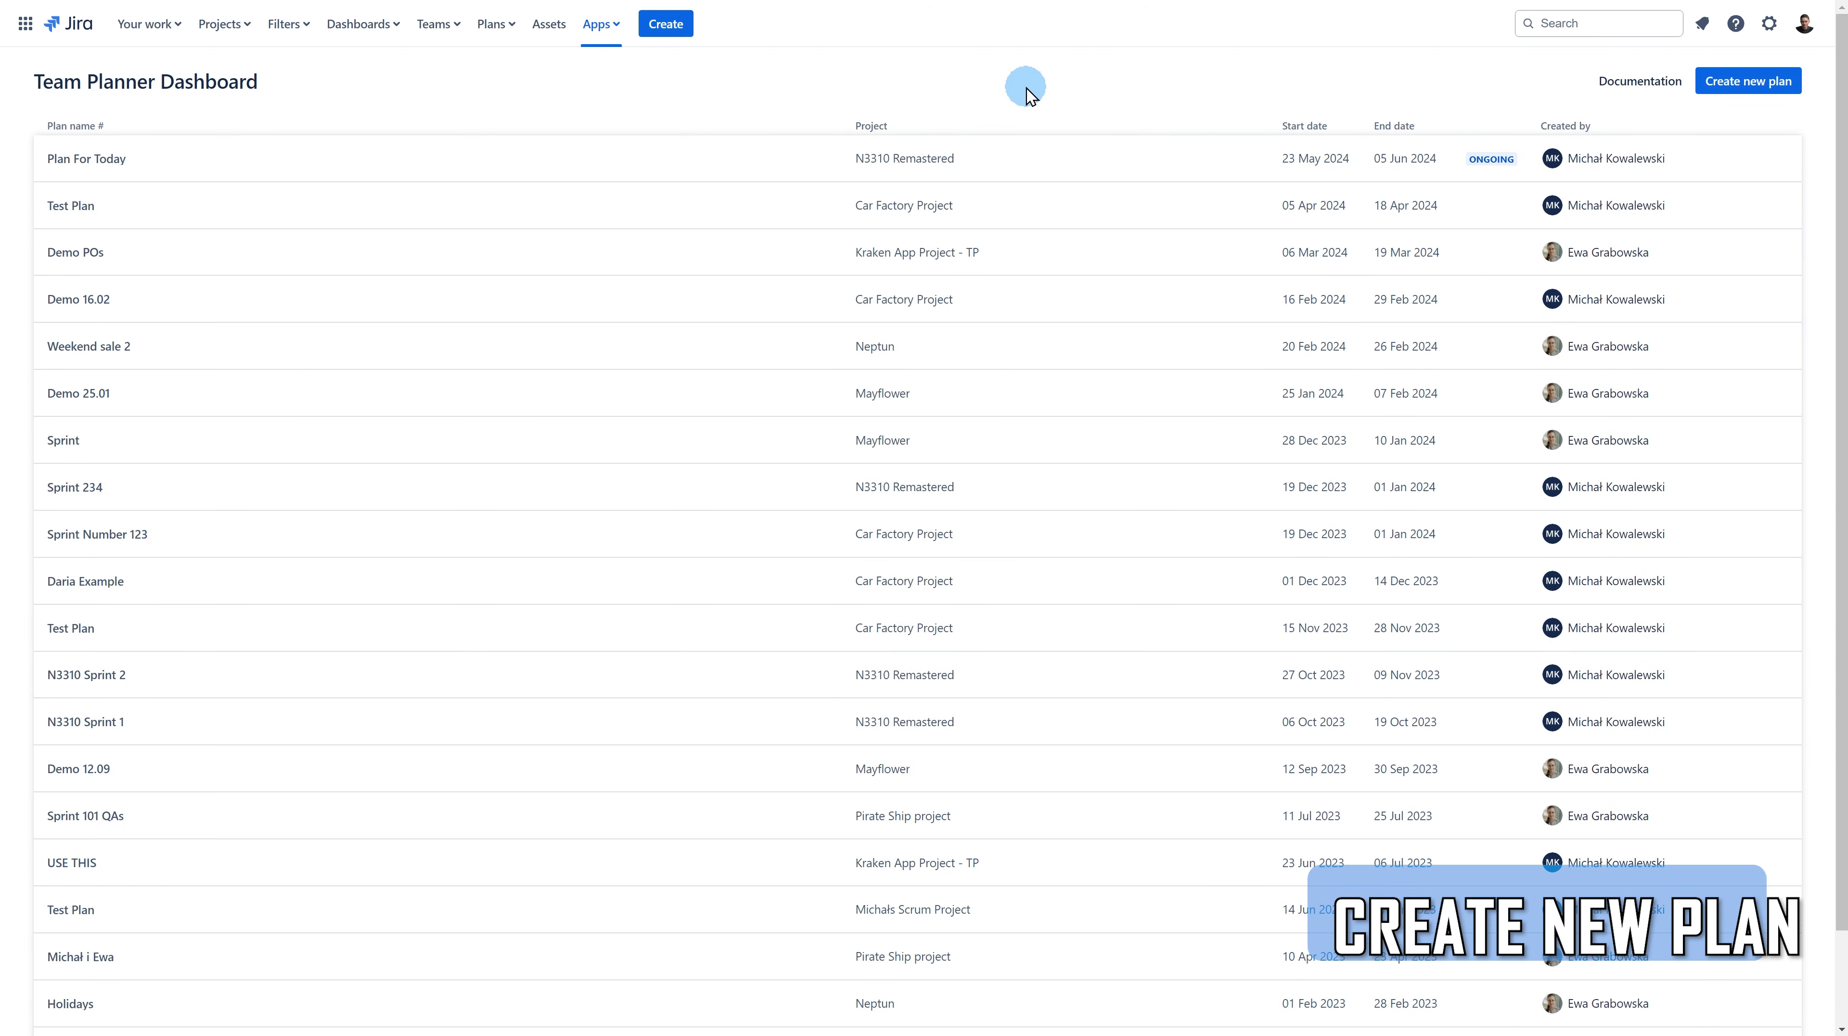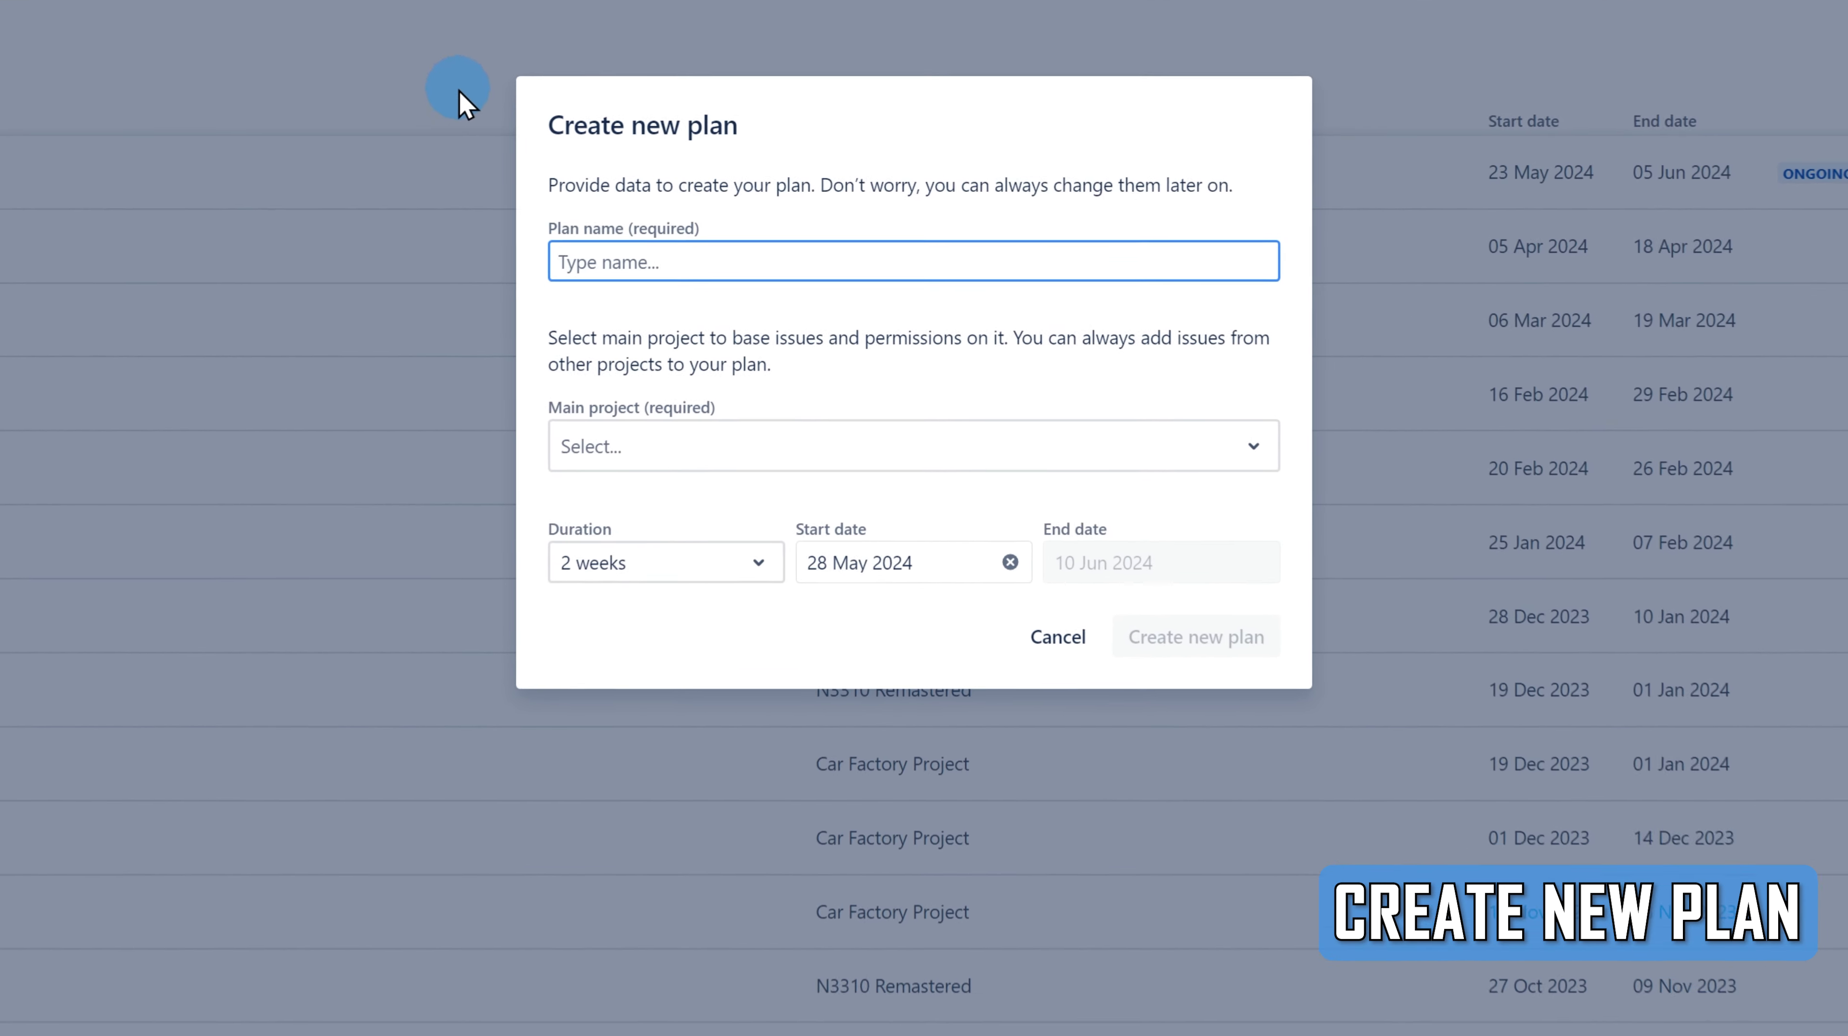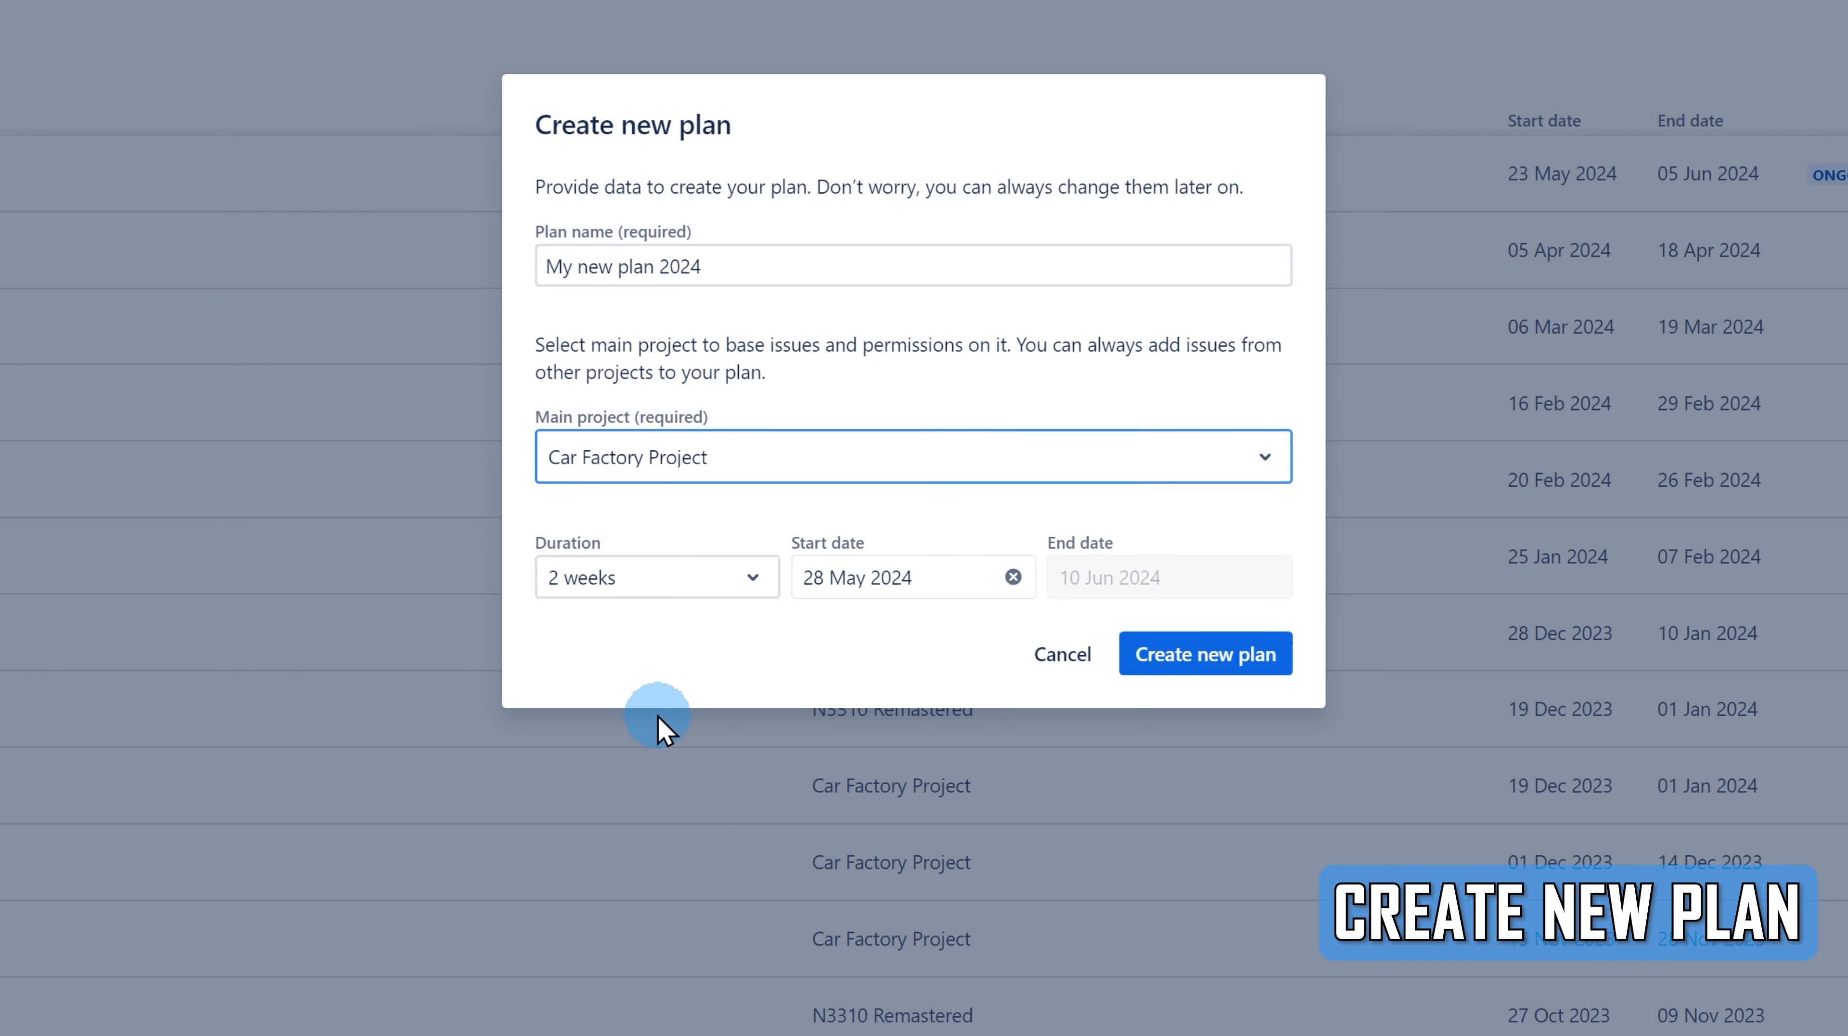Being on the Team Planner Dashboard page, click on the Create New Plan button to create a new plan. You will then see a modal where you must provide data to create your plan. Add the name of your plan. Next, choose the main project for the plan. Choosing a project is only important for the permissions. In case a user does not have access to the project you're choosing here, the plan won't be visible to him or her. Still, you will be able to use the tasks from multiple projects on your plan. The project setting cannot be changed later on, after you create the plan.